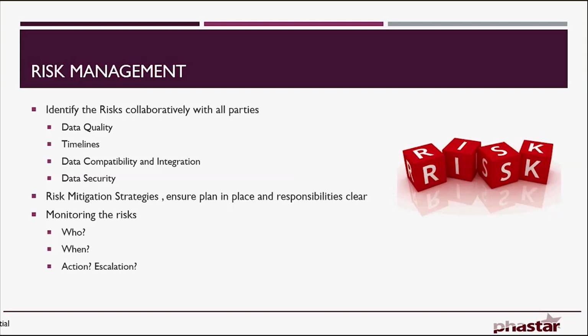Ensure there's a plan in place and responsibilities are clear for any mitigation strategies that you have put in place. One of the easiest mitigation strategies to put in place is to do test transfers as soon as you can after study start. But make sure you put those in the plan and make sure that responsibilities are clear.